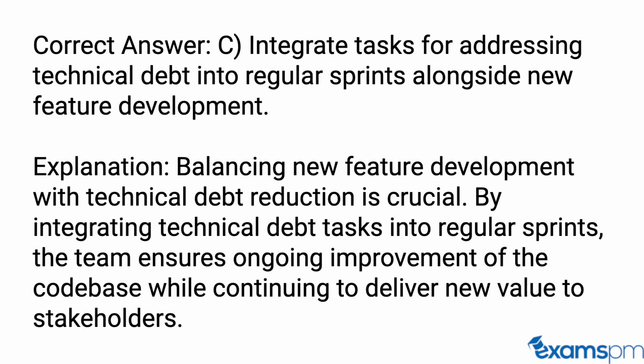Correct answer: C. Integrate tasks for addressing technical debt into regular sprints alongside new feature development. Explanation: balancing new feature development with technical debt reduction is crucial. By integrating technical debt tasks into regular sprints, the team ensures ongoing improvement of the code base while continuing to deliver new value to stakeholders.